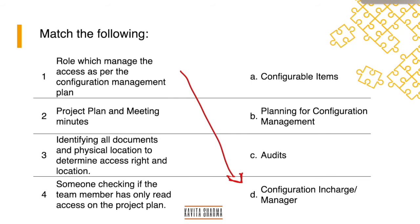So it goes to configuration in charge or configuration manager. Project plan and meeting minutes, what are these? These are configurable items. Identifying all documents and physical location to determine right access and location, what is it called? It falls under planning for configuration management.